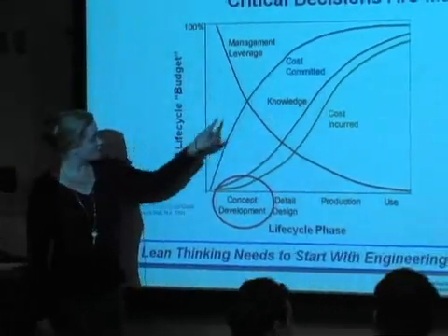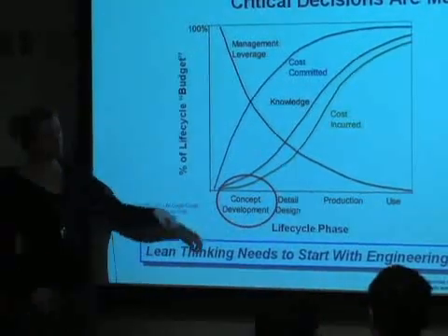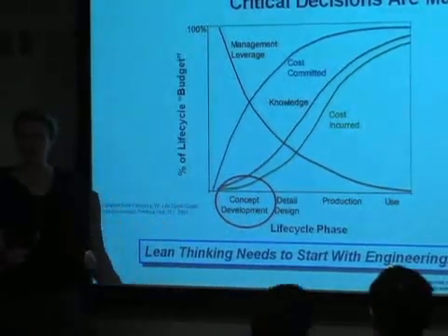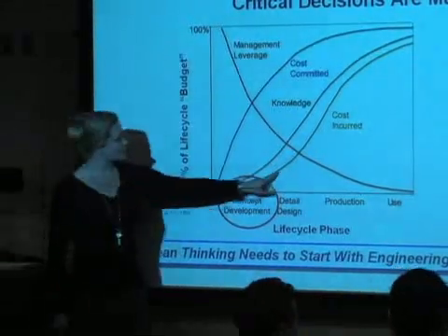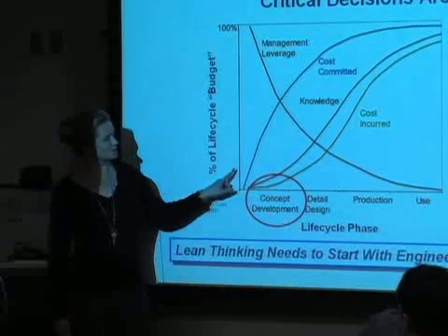But as cost is being committed early, it's really not being incurred by your organization for a while, because you're not buying materials, you're not bending metal, you're not into the expensive parts. That starts to happen over here, but yet you've already decided it way back here in conceptual design.